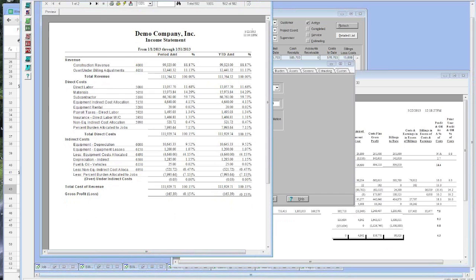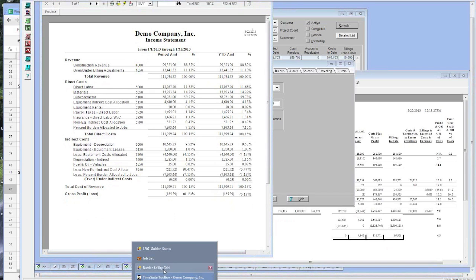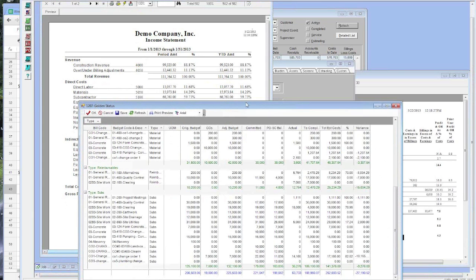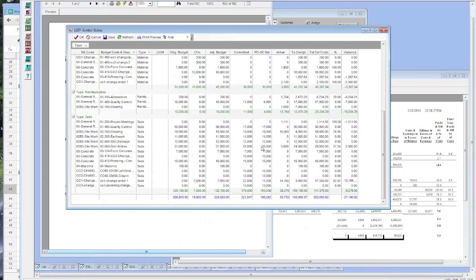Let's just go here. You want the accountability done on every line item with, what's my balance of my commitments? Did I buy the whole line item out? What's my total projected cost? So I have a balance here of $19,000, and they have $10,000 left to finish the job. Well, I have $19,000 in commitments out there, and I have $10,000 left to complete it. That doesn't make any sense. Why is that?